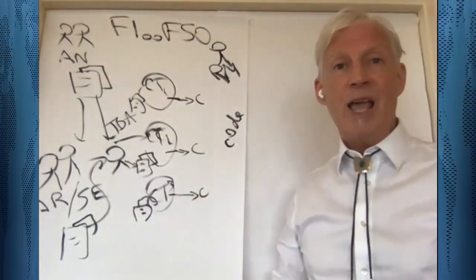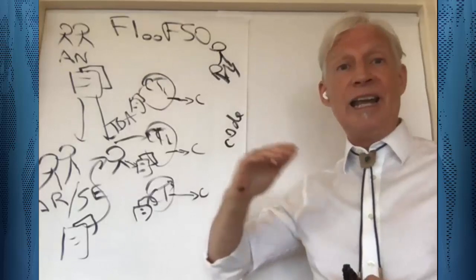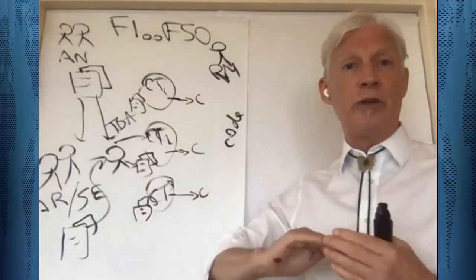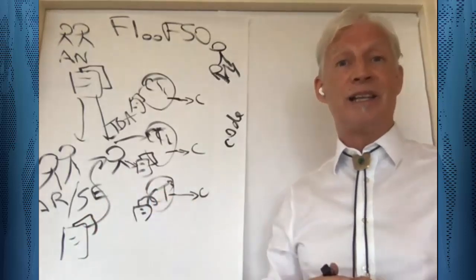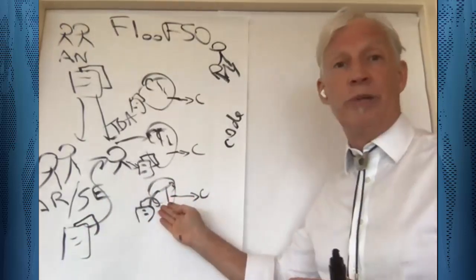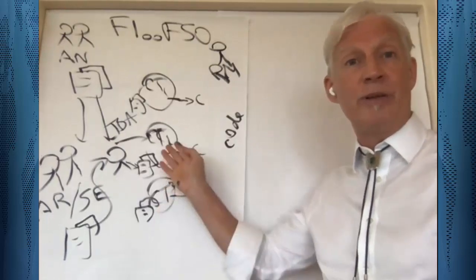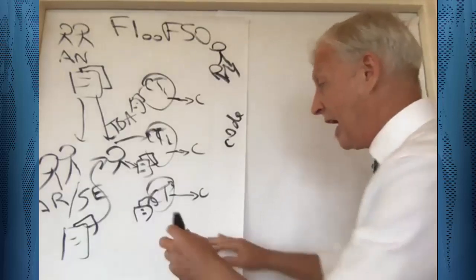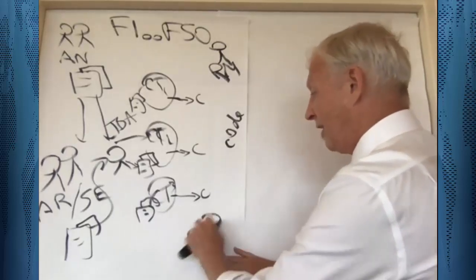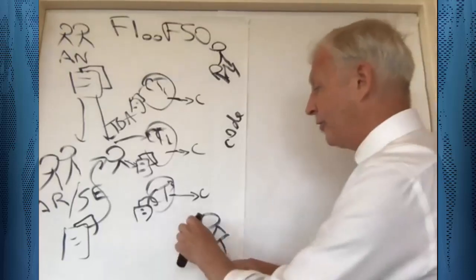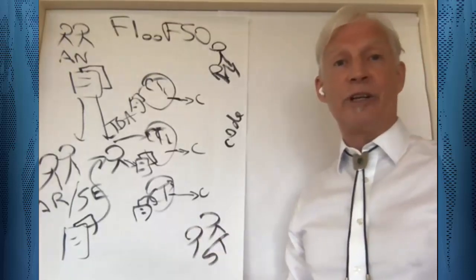And this person will take on a responsibility ultimately to ensure that all of the code is integrated for the release. Moving on, now that the feature is finished, or features are finished, it's time to do end-to-end testing on them. Question, who's going to do the end-to-end testing? Will it be the device driver team? Will it be the middleware team? Of course, it's not clear when you have component teams. And so let's introduce another role. Let's call those people system testers, and they'll do end-to-end testing.